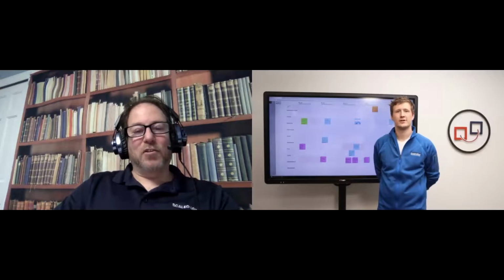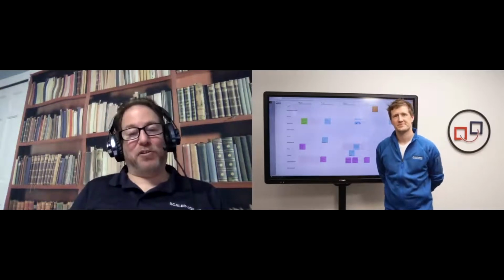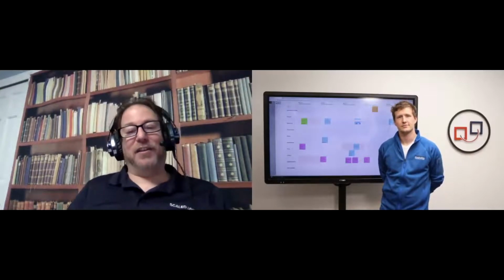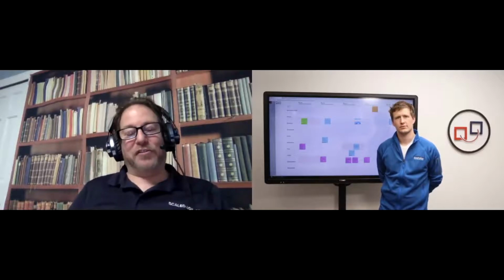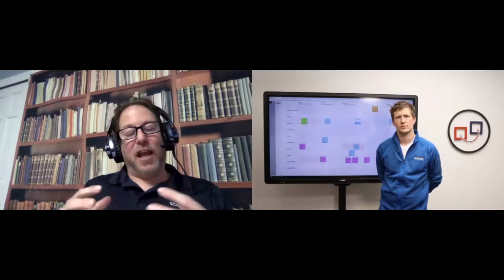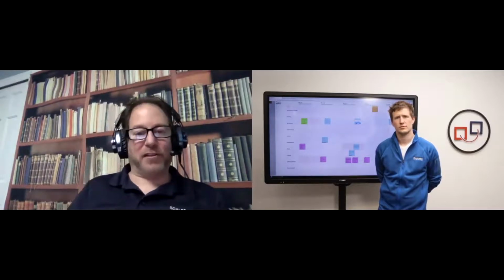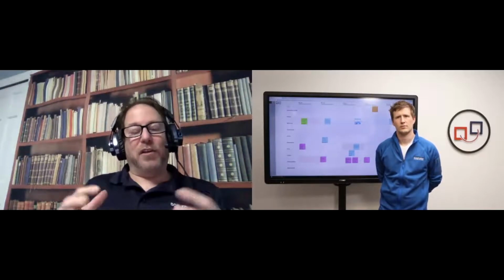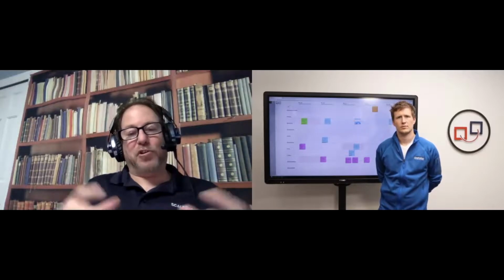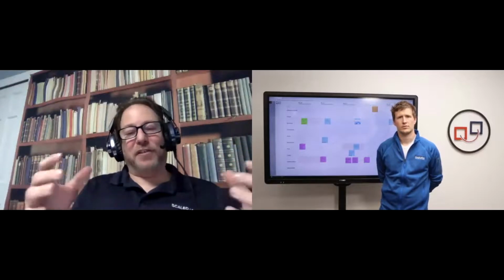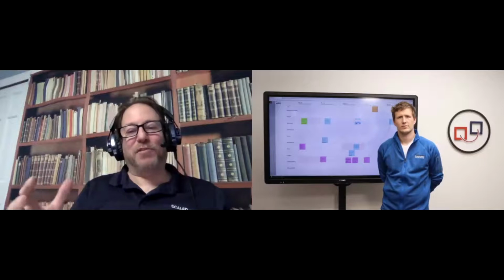Such a picture. Right. If you have 60 features, that tells me those aren't features. Typically, those are tasks. And activity does not provide value. It's delivering new functionality, which we normally express in terms of features, that is really going to provide value to your customers. And you're also going to have a lot of work in process, and having too much work in process is also going to delay you. You start losing the forest through the trees in that case. What are the really important things that we need to get done? When you have 60 features, you don't really know what's important.